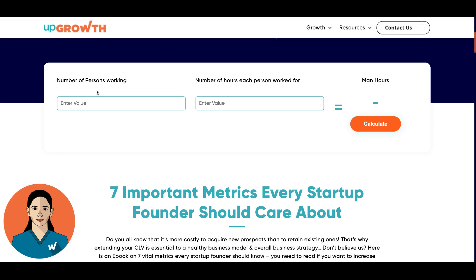Here we have two input fields: number of persons working and number of hours each person has worked for. Now we enter the number of persons working — let's say it is eight — and then number of hours each person worked for is, let's say, nine hours.